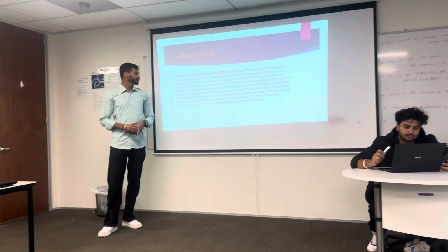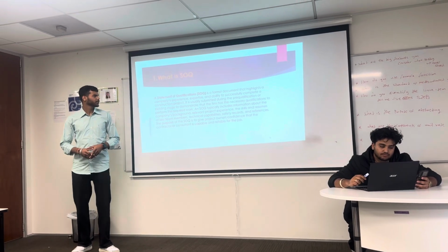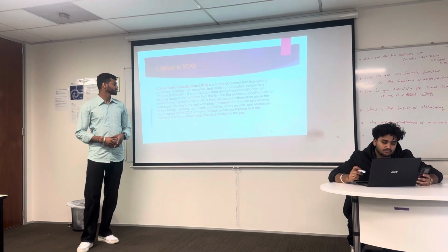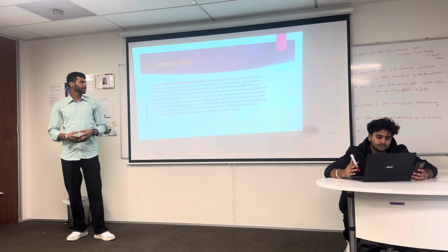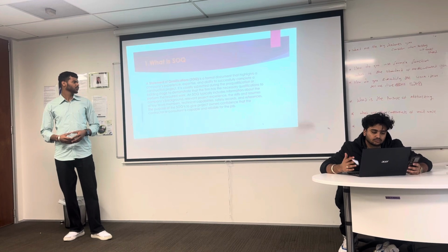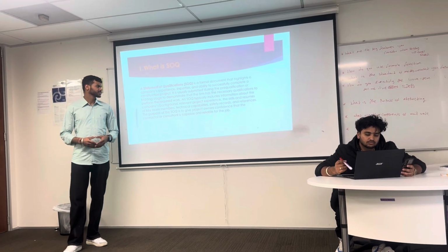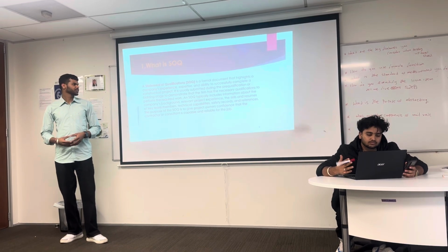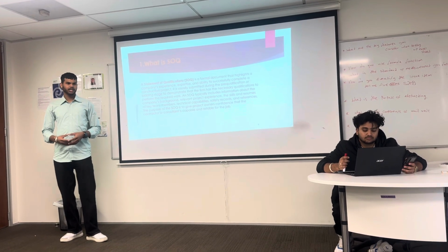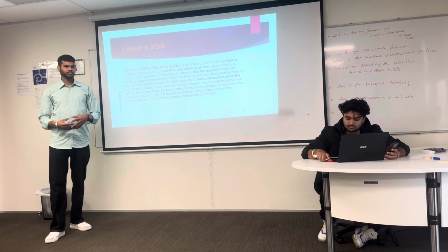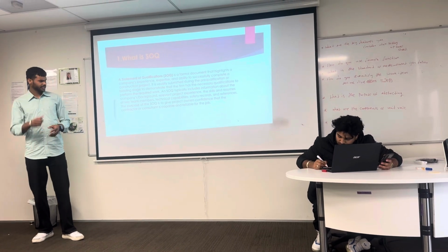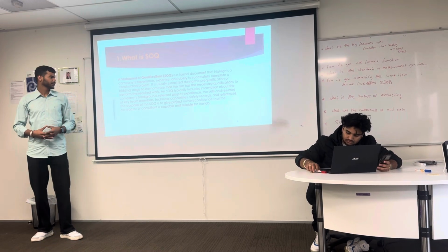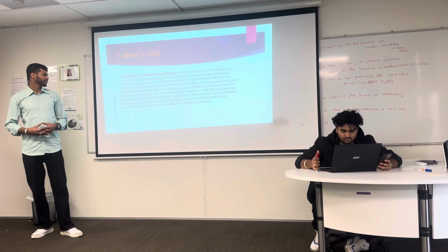SOQ stands for a statement of qualification. It is a formal document that highlights a company's experience, expertise, and ability to successfully complete a construction project. It is usually submitted during the pre-qualification or bidding stage to demonstrate the firm has the necessary qualification to perform the required work. And SOQ typically includes information about the company's background, like whether the projects completed by the company were successful or not, and the skills and resumes of key members, technical capabilities, safety records, and references.